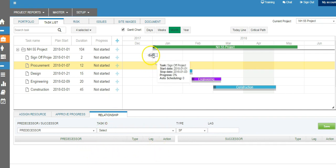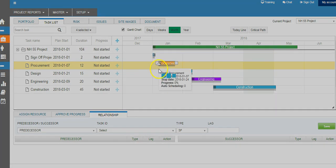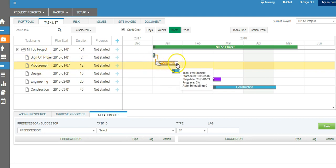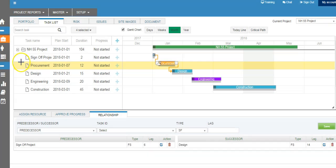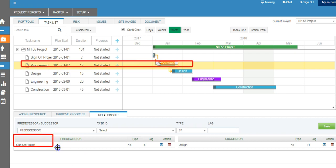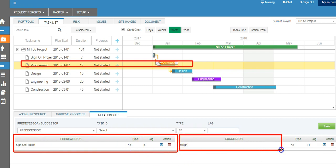Now let's build some relationships. For example, once the sign-off of a project is completed, you will be doing the procurement, so you connect them as a finish-to-start relationship — meaning once the sign-off is done, the procurement will take place. Likewise, once procurement is done, the designing takes place, which is also a finish-to-start relationship. You will see that procurement is now related to sign-off as finish-to-start, and the successor is design — so after procurement, design takes place.